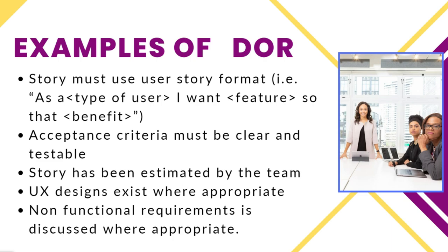UX designs exist where appropriate. So if you have design and you want to make sure that those designs are already attached to the story and those designs are discussed and we have accepted them, then that could be a part of your definition of ready, that the design is done. Some teams do this, some teams don't. Some teams might say, we already have the design systems. We already know what the standards are. So if we need to write a story to, let's say, add a new modal, we don't really need a design because we're already going to pull from our existing pattern for what a modal looks like. So all we need to know is what's the new things that will go into this modal, but we don't really need a design. It depends.